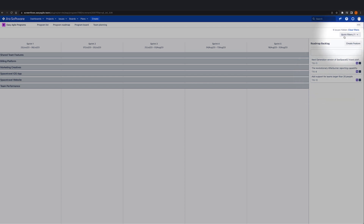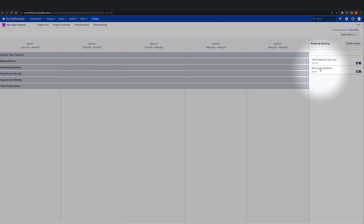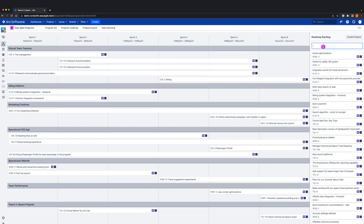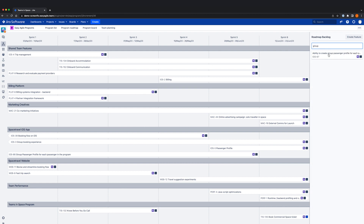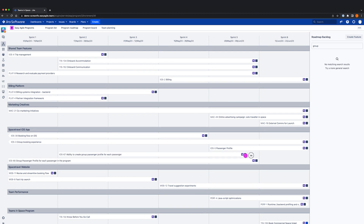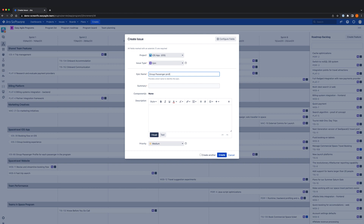This is helpful to show a subset of issues important to business owners, identify priority features, or to highlight different types of work items to ensure balance in the upcoming increment — for example, to make sure there is a balance of product features, tech debt, performance work or bug fixes scheduled. You also have the option to search for an existing feature. To schedule work into a PI, you can simply drag and drop the feature into relevant team swim lanes or the shared team features swim lane. Changing the length of the feature will change the start and end date according to which sprint you'd like to schedule. You also have the option to create a completely new feature without leaving Programs, which is helpful if you would like to plan future program increments or quarters in advance.